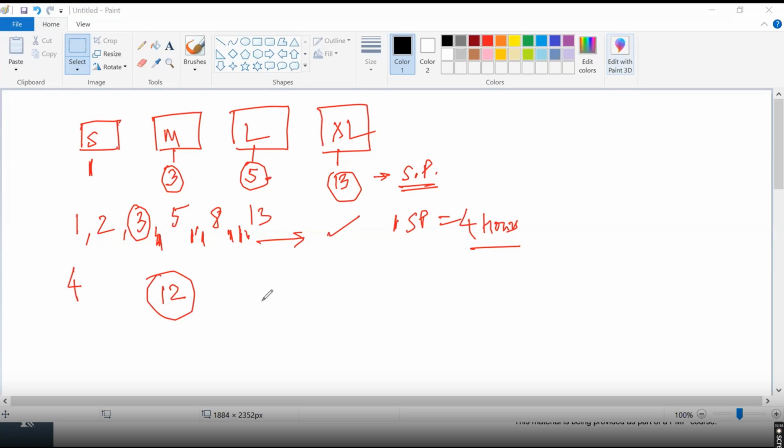If I say 5 story points for each large, it will take about 20 hours of work to complete a single large user story. And similarly, 13 multiplied by 4, whatever the number comes to. So this is how you estimate. First of all, you assign a certain story point, and the value of a story point is generally taken as 4 hours, which is most common. People can definitely look at variation, customization, but in most places a story point is kept as 4 hours. Half a day of work is about a story point.